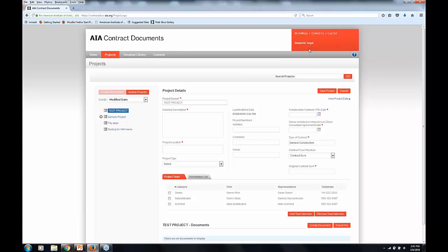So I think I sort of covered this in general, but this is more specific. This is G703 column I. Can that be formulated? And so the answer is no, it can't, because that's supposed to be for a variable rate. And so you're supposed to put in the dollar amount, whatever that is, for every single line item. And so there's not a formula or some sort of calculation you can put in automatically. You would have to do that. And again, if it was a fixed rate, you wouldn't bother with that at all. You would just put it in the G702, and it's already there.